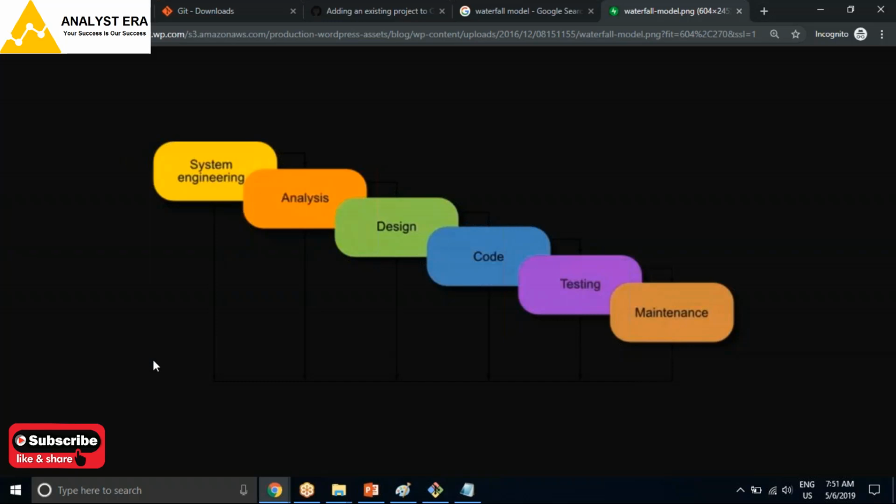What the Waterfall Model says is, unless and until I am done with analysis, forget about system design. Unless and until I am done with analysis, I will never go to the design phase. And once I am done with the design phase, then only I will start coding. Once I am in coding, if you come to me with any new changes, I will not change it, because you should have come to me in the design phase itself. I have already designed the application and got your approval. You already approved that. That is the client. So we have taken the client's approval in the design phase.